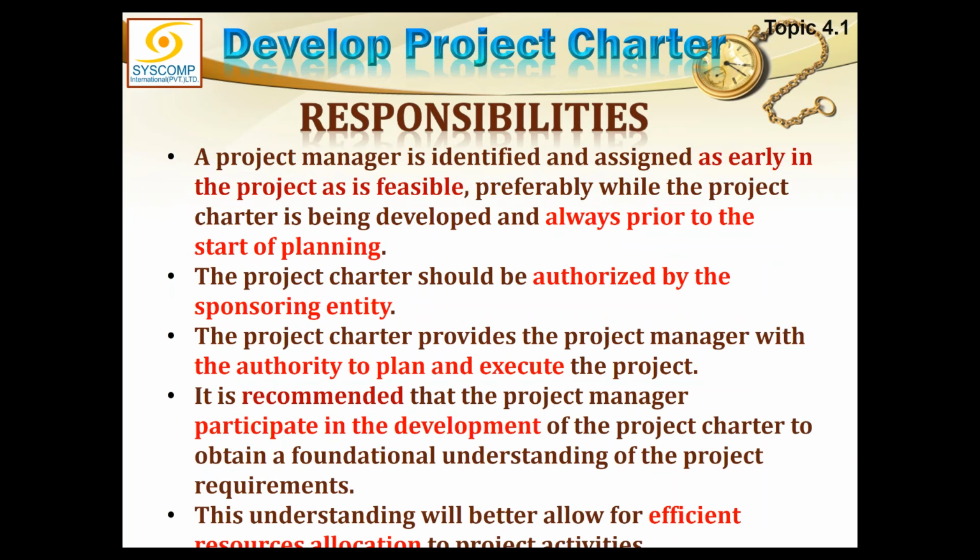A project manager is identified and assigned as early in the project as is feasible. Very important: as is feasible is the key. Do not try to hire a project manager 10 years before the project starts. It is not feasible at all. From where are you paying him? Preferably, the point to look for a project manager is while the project charter is being developed.